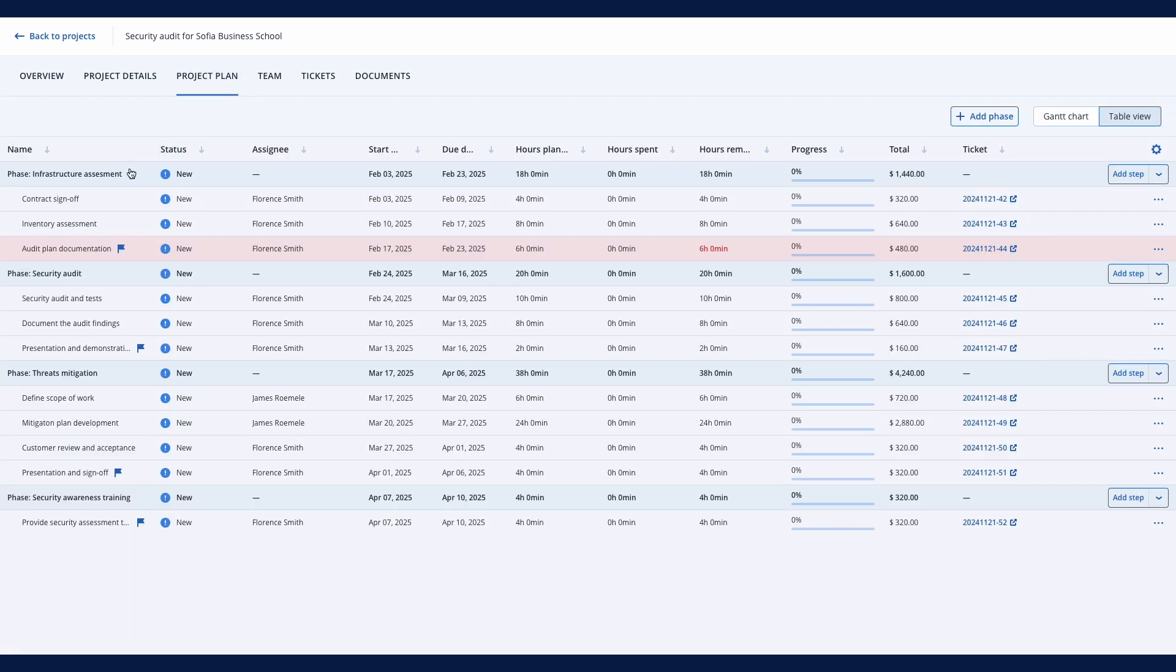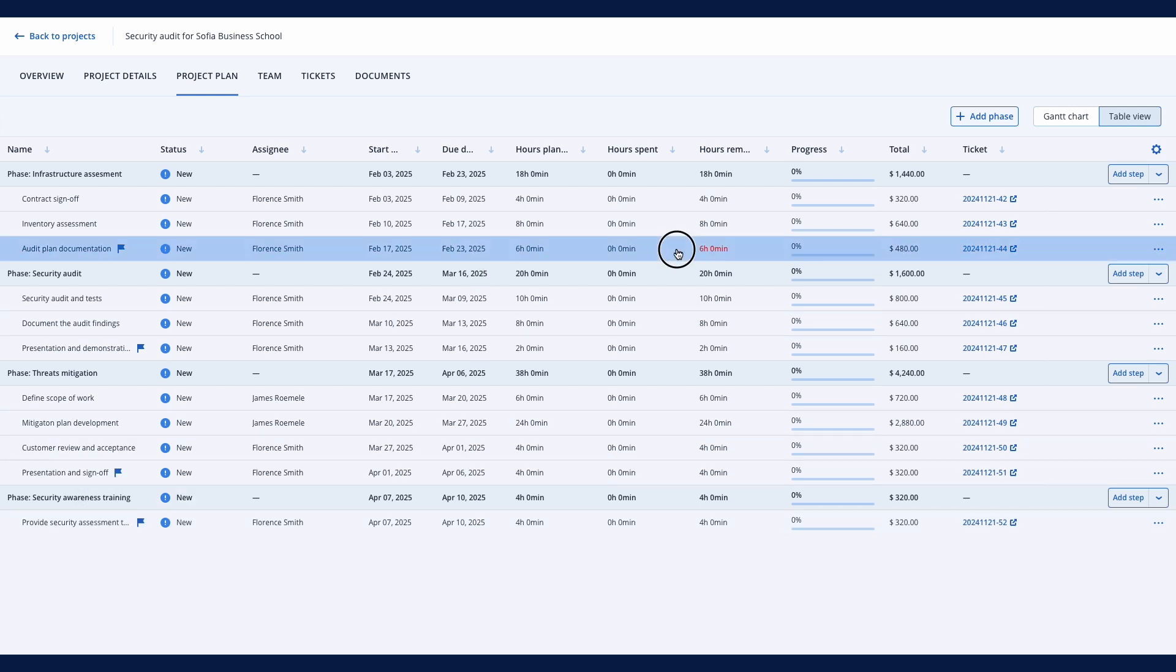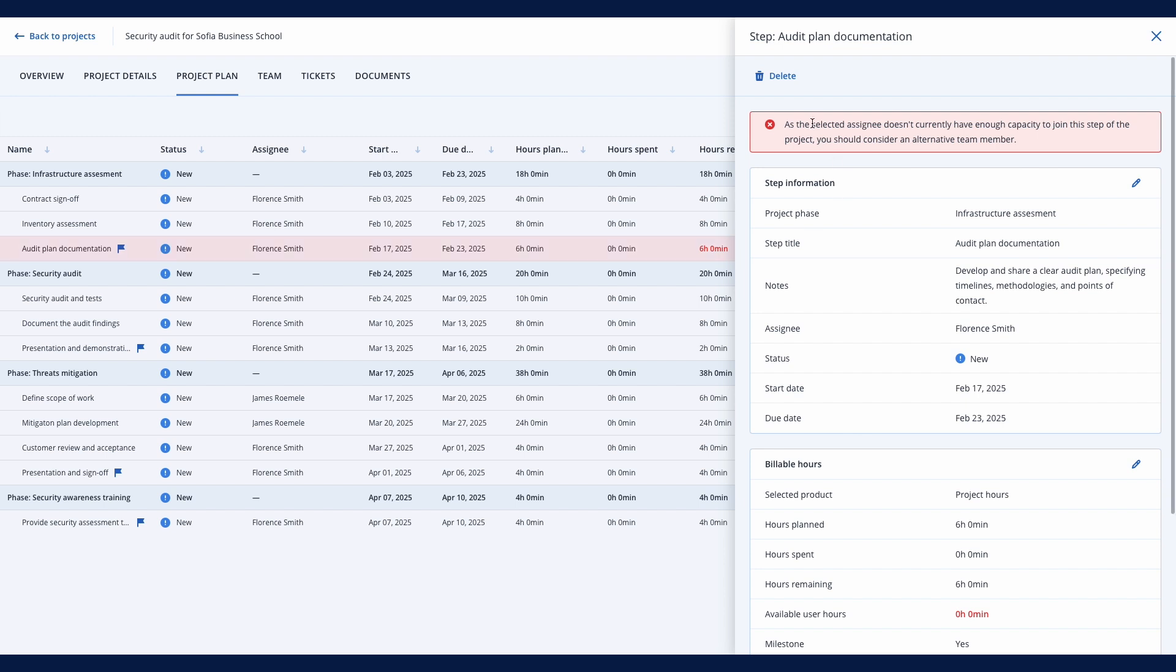The Project Management module is tightly integrated with other Acronis PSA modules. From a billing and invoicing perspective, you can automatically bill clients upfront or upon project step or milestone completion.